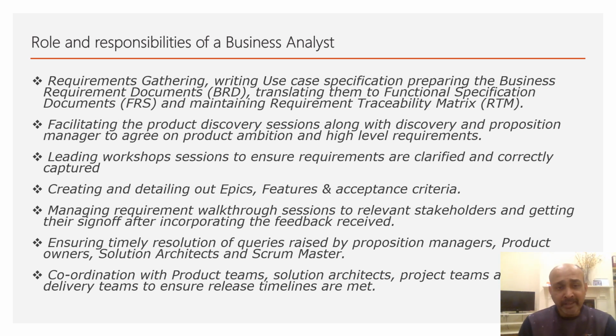So this is how you maintain the requirement documents, and the traceability is something which you ensure that, say for instance, you have captured requirement number one, so how it is flowing in the solution document, how it is going into the testing document, how it is going into the implementation, how the end user has actually started using it. So how your requirement is traveling is traceability, wherein you can go back and immediately look, okay, if this particular test case is there, where this test case is coming from, is it requirement number 1, 2, 3, or what is the history of this particular requirement.